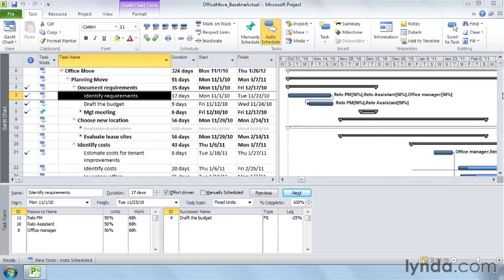By comparing your current scheduled values to the baseline, you can see whether the project is on time and within budget. When you get the project plan the way you, the project customer, and the management team want it, you save that plan. In Project, you save a baseline, which is a set of dates, task durations, work hours, cost, and other fields that you try to meet when you execute the project. The Gantt chart view shown here doesn't show the baseline initially.